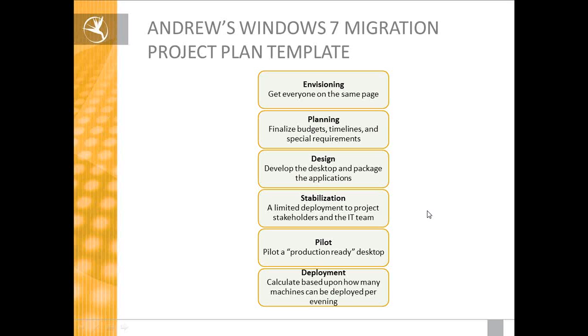We include stabilization, which, as I mentioned before, is sort of a pre-pilot, and the goal during stabilization is to knock out 99% of the bugs. So by the time we get to pilot, we want everything to be going really, really well. We want the pilot users almost to be serving as advocates within the user community that, hey, this is great, this is coming down the pipe, you should be excited about it, you should be looking forward to it. We don't want the pilot community being really burdened by something that's breaking all the time.